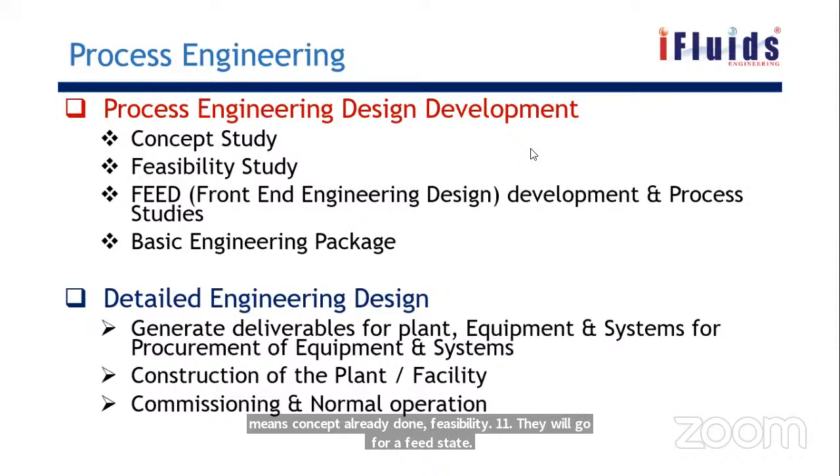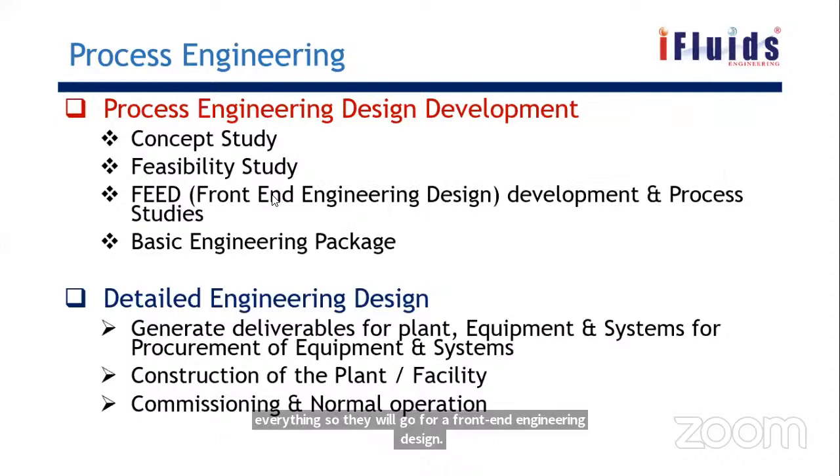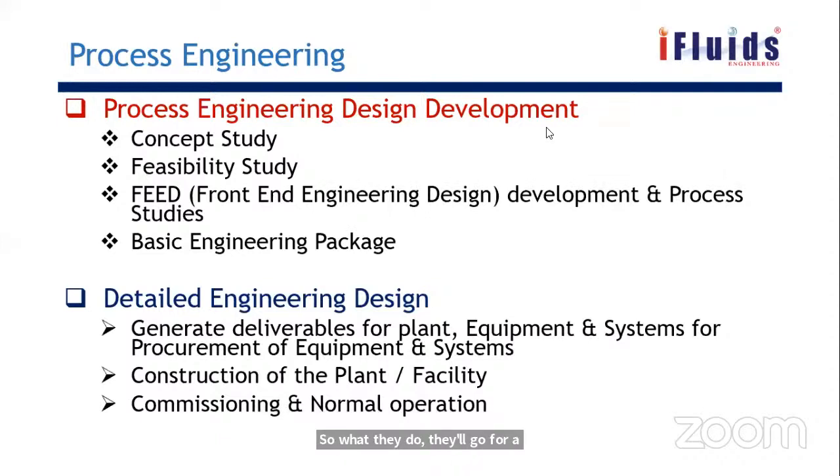FEED stage means how much budget will be required, how much capacity they can put, how much area is required, everything. So they will go for a front-end engineering design. They will go to a company like UOP or KBR, or universal companies, which have huge experience. After the FEED study, they will come to know how many equipments are required. Those things will be seen in the next.